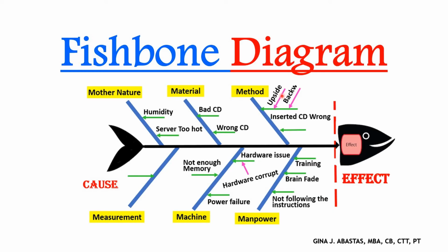Fishbone diagrams, I mean, are excellent for resources, no? So these are excellent in identifying hidden factors which can be significant in enabling larger activities, or, as I've said, resource areas or parts of a process. Fishbone diagrams are not useful for scheduling or showing time-critical elements, okay? So at a simple level, the fishbone diagram is a very effective planning model and tool, especially for mapping an entire operation, not the scheduling.